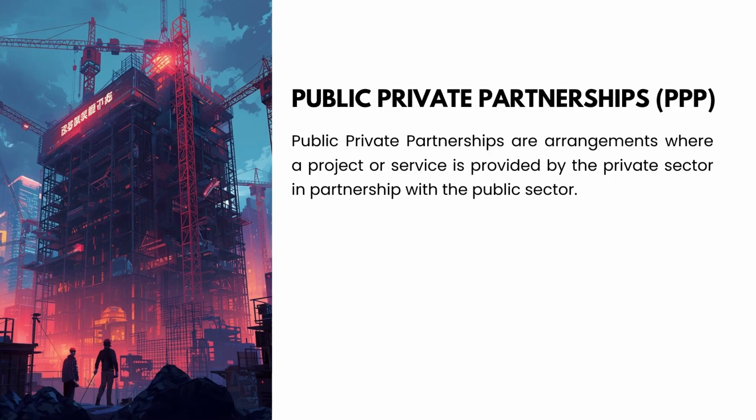Finally, we have public-private partnership, also known as PPP. This is where the public sector, like government organizations, collaborates with private companies to deliver a project or service. In this arrangement, the private sector may be involved in financing, designing, constructing, and even operating the project. It is commonly used for large-scale infrastructure projects.